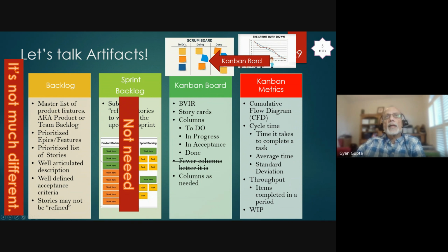So what we do is, okay, we can have only 10 donuts in the fryer at a given time. That's your WIP limit. If you get 12 donuts, then there's a problem, and we need to slow down the assembly line. Slow down the machine so it does not make that many donuts to put in the fryer, right? Same thing happens in Kanban. When we have multiple columns, we want to make sure that each column has a WIP limit. How many items can you have? A rule of thumb is probably 2 cards per developer in the development environment, right?